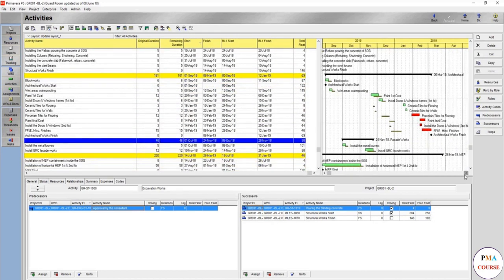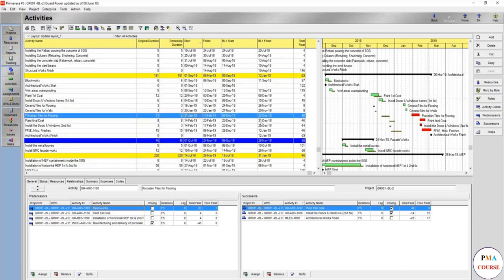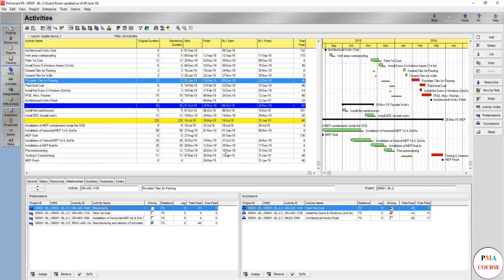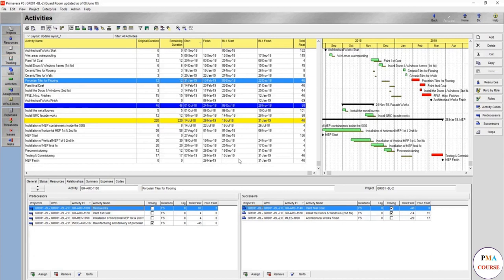This one is going to start first but is not driven anymore by this. It's driven by the data date. It's actually going to start earlier which is good for us. But why the project is shifted? This one is shifted mainly because of the procurement. So now the critical path has changed or another critical path has emerged. It's actually the same almost same activities but another region became the more critical reason.